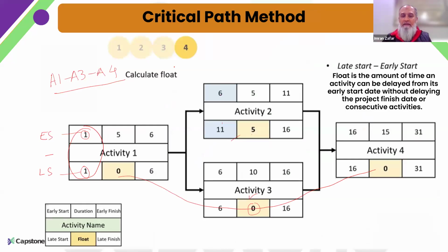Like in this example, I have this activity. This activity is not on the critical path. I have 5 days of cushion available here. In this scenario, if I see that the resource may not be required on, let's say, day 6, the resource may be available on day 8. Again, it will not impact my schedule for this activity, because ultimately it will still finish on day 13.